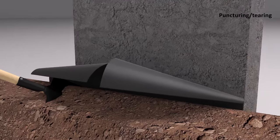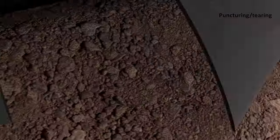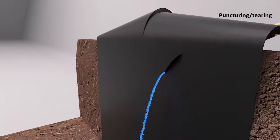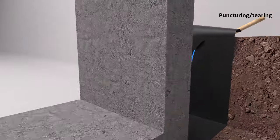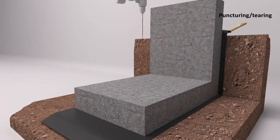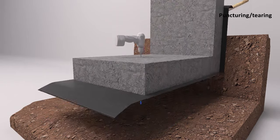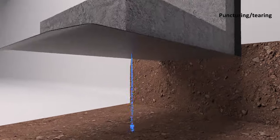Waterproofing membranes are exposed to a high risk of damage. Often this damage occurs in the subsequent stages of the construction schedule. Puncturing often occurs, for example through concrete drilling, backfilling and pipe installation works.